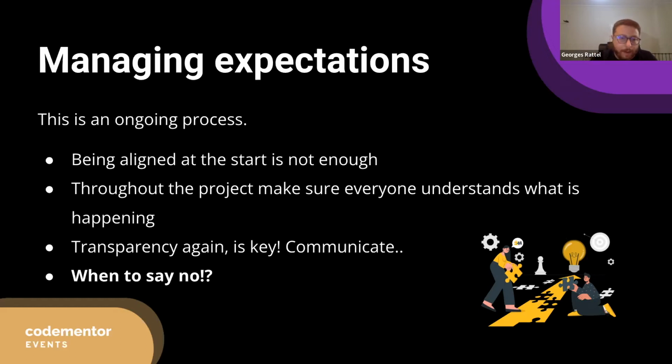And that's why it's also important to understand when to say no. And it's not only when to say no to a project, it's also when to say no to a certain feedback or a change request, because throughout the development life cycle, and as you're building the project, sometimes the clients suddenly realize something from the market and they would like to add a certain feature, for example. And if you keep saying yes, you're basically trying to please the client and make them happy and prove that you're a good developer. But at the end of the day, this might cause a delay on the project.